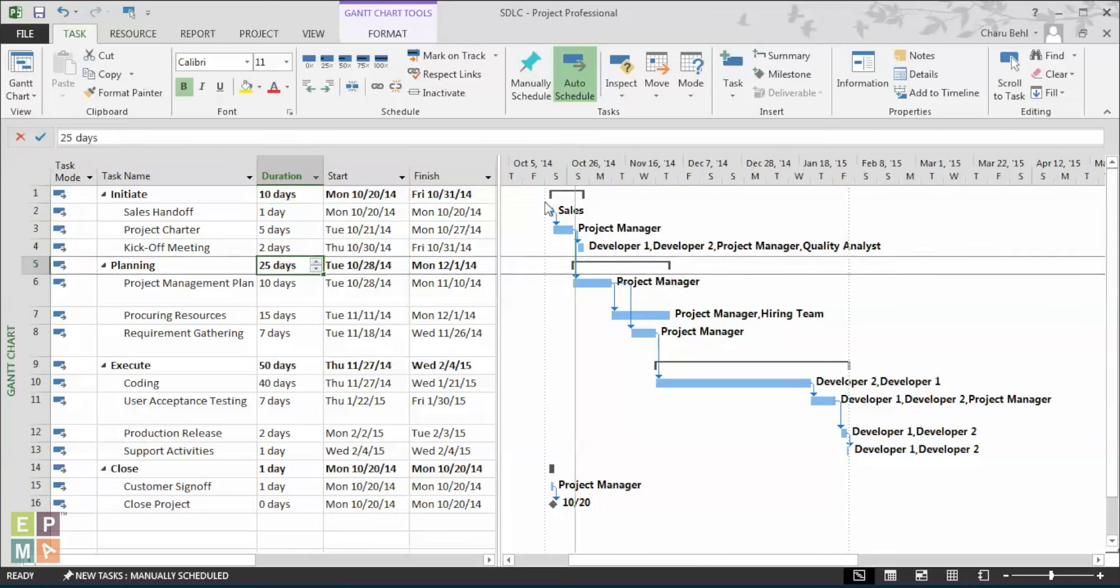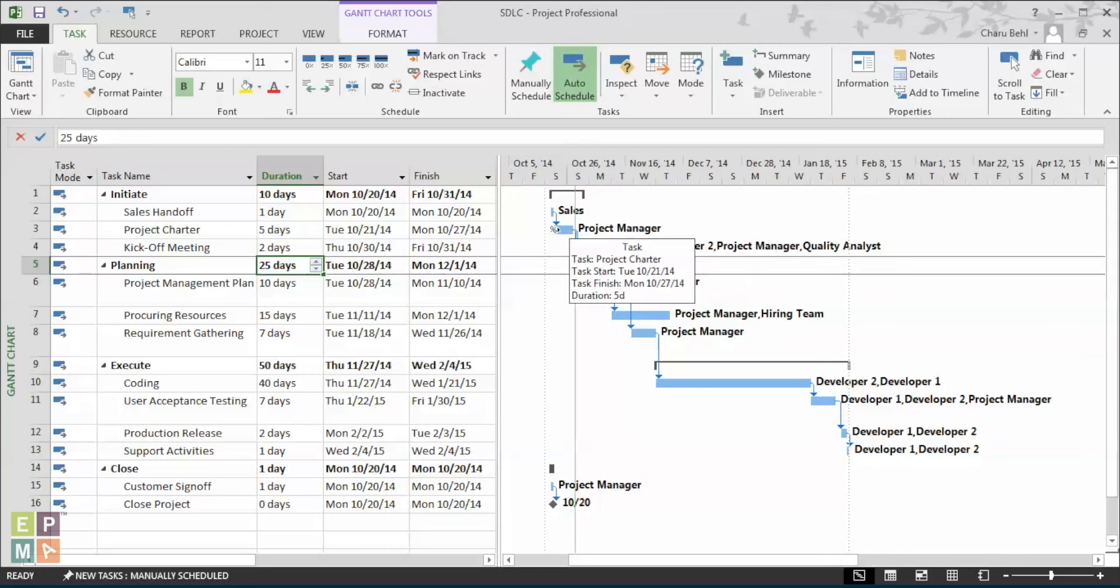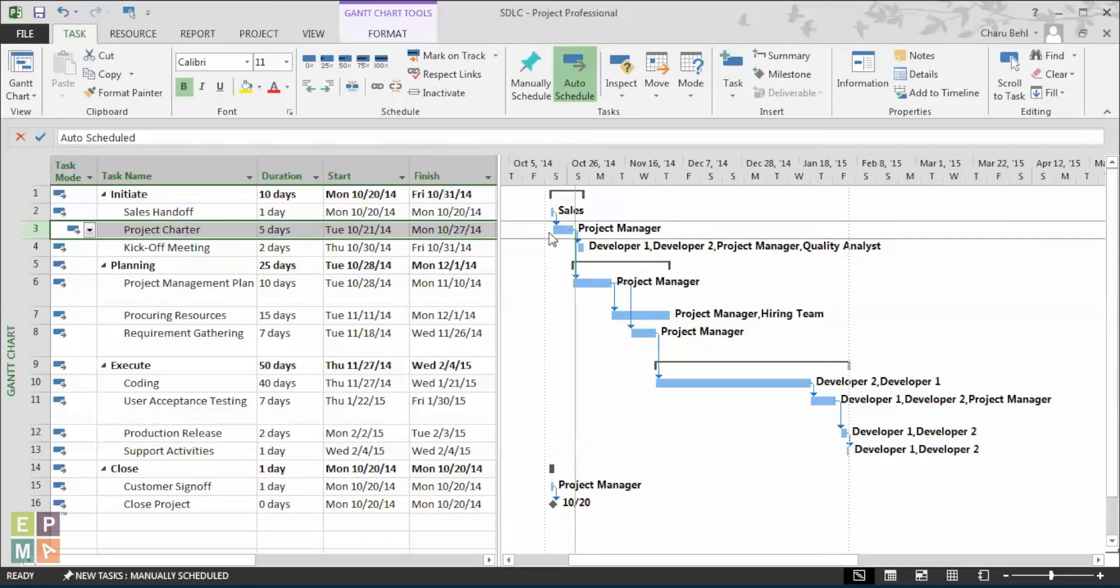On the right-hand side of the Gantt chart, you might notice that the graphical representation of a summary task is a black rectangular bar. And you see how it is different from a normal task? A normal task is represented by a blue bar or a blue rectangular bar.